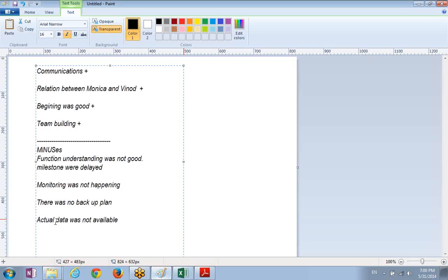The offshore team. Vinod agreed with Mr. Kevin that the offshore team would prepare the test data as much as possible, which they could use to certify the software. And that didn't work. It created a problem. So it was not a very good plan. Not a very good risk approach.